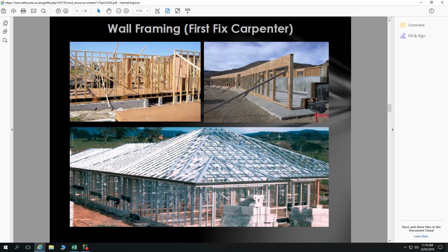We need to cure concrete. Yes, it is the most important because that will give the concrete strength. I don't know what they are following here, but what my studies told me, we need to wait at least 7 days. I have worked in a ready-mix concrete environment, where we used to take cylinders and cubes while pouring the concrete. We need to make the first test after 7 days to check the compressive strength of the concrete, and the second test after 28 days.